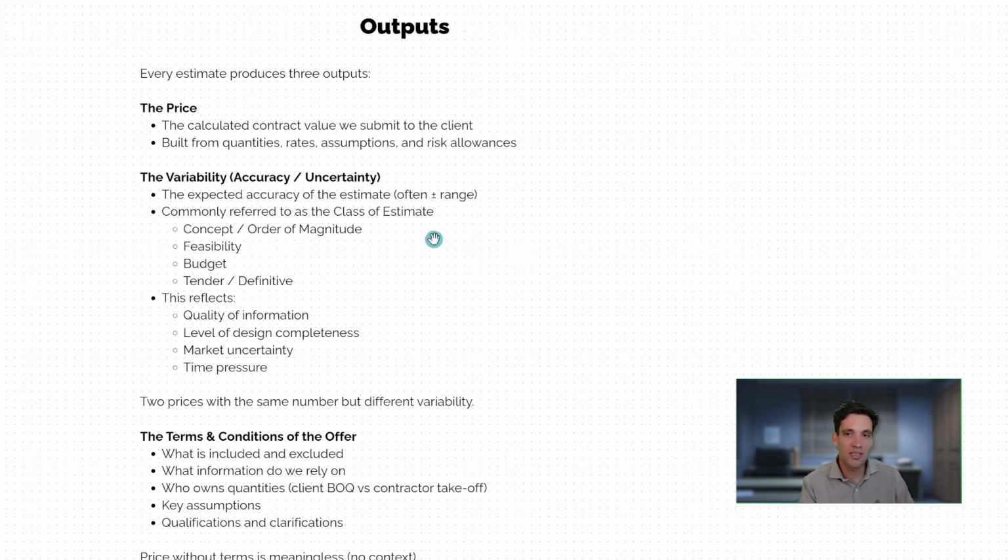So very early on in the project, we may only be able to produce a concept or order of magnitude estimate if we have a poor quality of data, only early stage concept design drawings. We then would go through feasibility where we're adding more detail and design to the project.